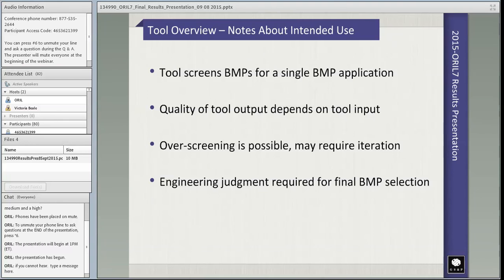So it actually helps prompt the users to identify some of the key features to get you to selection of a BMP. We realized through the stakeholder interviews that that was something that was lacking, that often the BMP selection was put off till the end of the project, leading to a lot of limited options and maybe even increasing your costs of the potential BMPs.